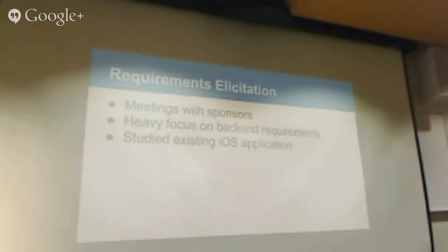Yeah, we basically did a breakdown of what the features are. During those 4 weeks we explored a lot of features that were in the iOS app, and we prioritized them the way that we thought they would be in terms of importance and overall benefit to the user. Then we presented that to our sponsors and negotiated some of the features in order to limit scope and figure out what order we would do things in.